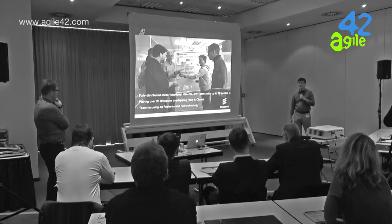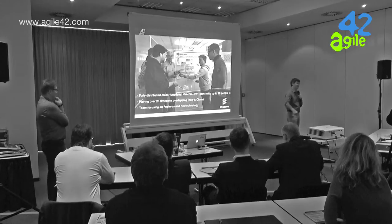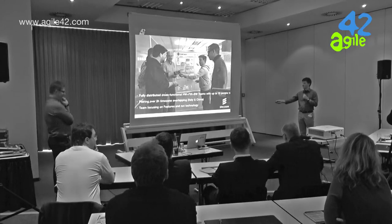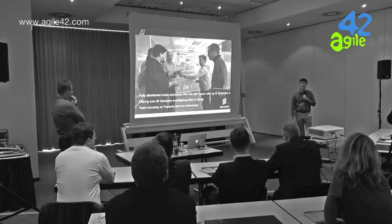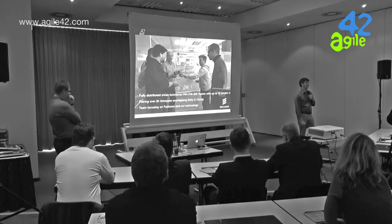Hardware was developed in China, firmware was developed in Sweden, and software was developed in Germany and Italy. Okay? And each of them was supposedly doing his part and putting all in the same pot, mixing it up and hoping it was working. So what we did instead, even though we only had 2 hours of overlap between Europe and China, we forced them to work in fully distributed Scrum teams.